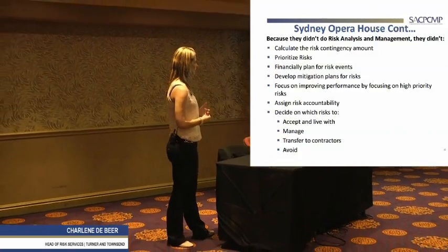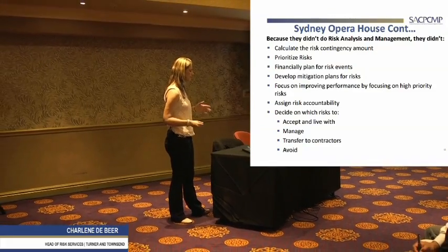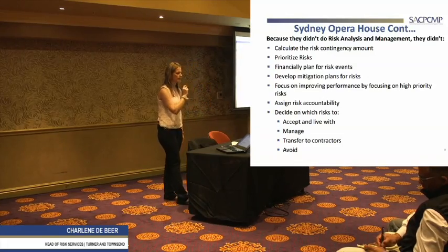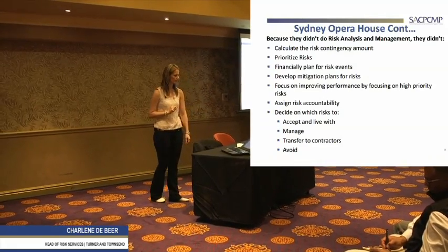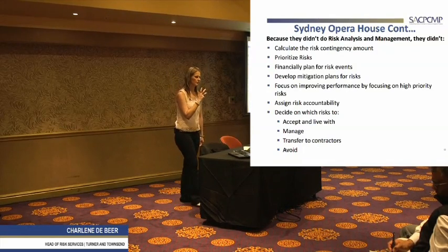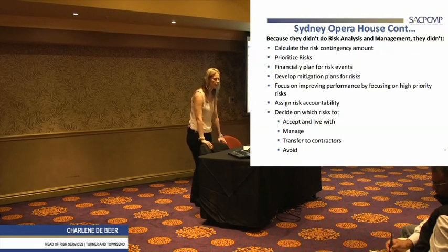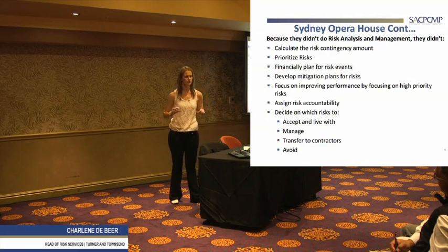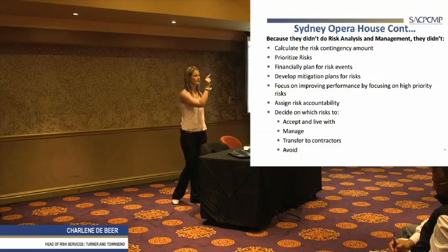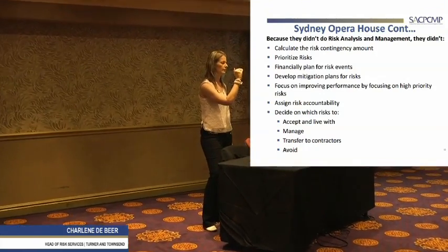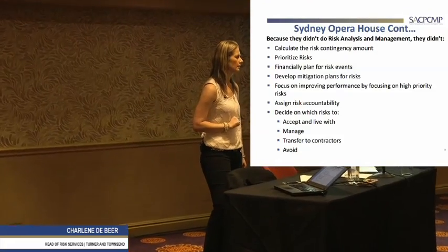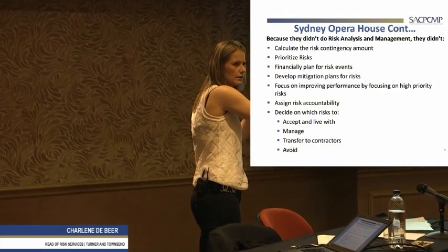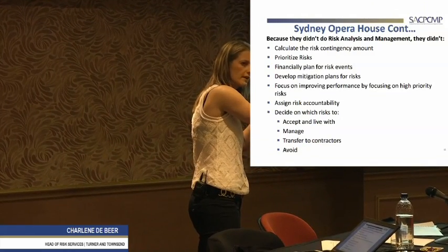So develop mitigation treatment plans, very important. Funny enough, if you guys don't know, in mitigation and treatment, you never mitigate or treat the risk. You treat and mitigate the cause. Because the risk will have multiple causes. And you need to mitigate the causes in order to bring the likelihood or the impact of the risk down. You never mitigate a risk. The risk will be the risk. You need to mitigate what is causing that risk to happen, or what's going to cause that risk to